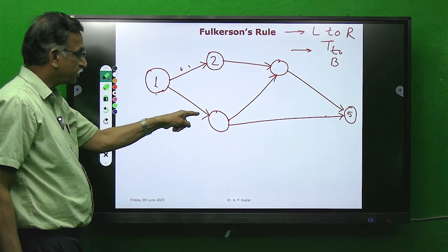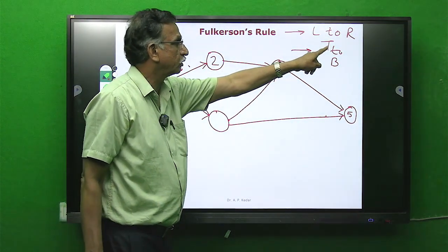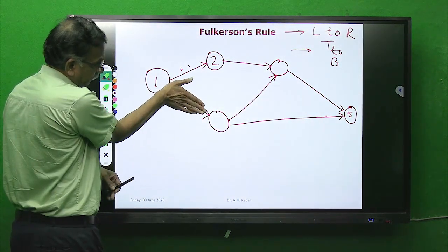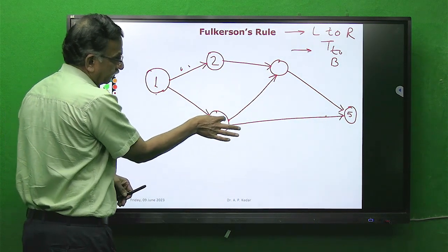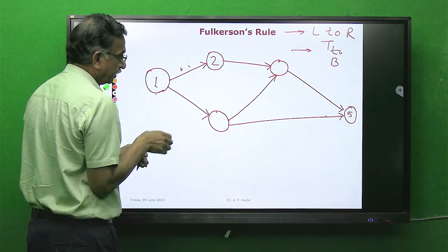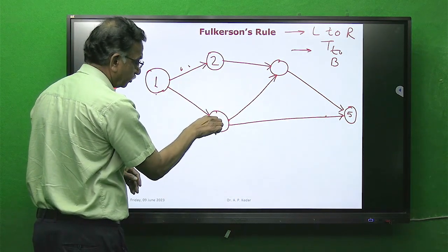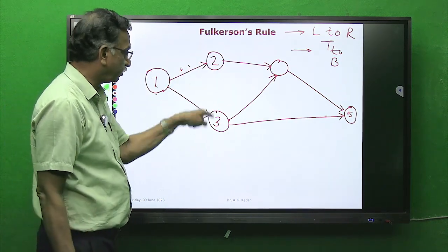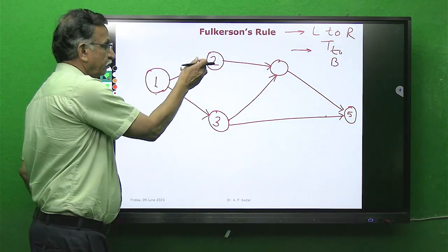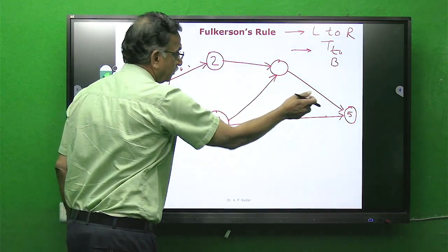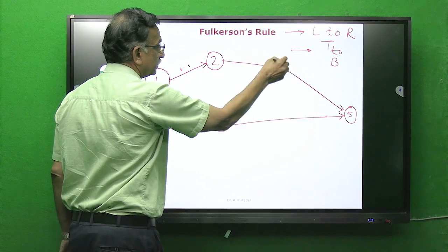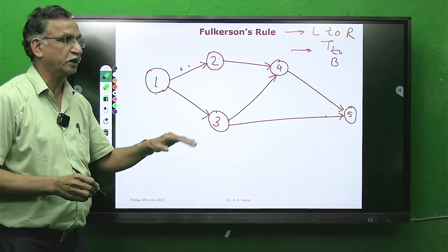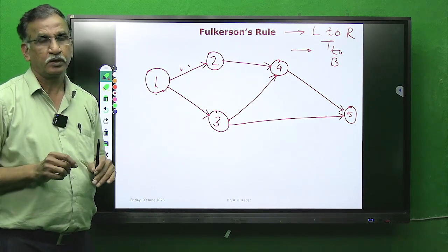The other, from top to bottom, emerging from, if I again hold my palm like this, has 2 outgoing arrows but no incoming. So logically this will be 3. Left to right, top to bottom. I have given numbers 1, 2, 3, 5. The only number remaining is 4. So this is what, in simple terms, we will see again with a complicated problem for numbering the events.